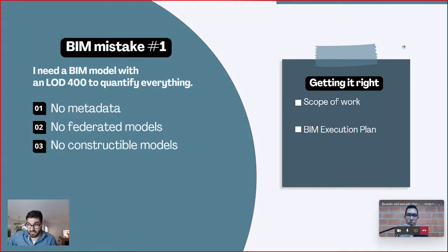And obviously that's not realistic. But the second mistake that I would add here is the BIM execution plan. I did this too. I downloaded the BIM execution plan from the internet, and it's very generic. It doesn't tackle all the trades or all the components that we're using for that specific project. I just skimmed through it and started using that. Obviously that's not the best way, and since then I stopped, because that's not practical.